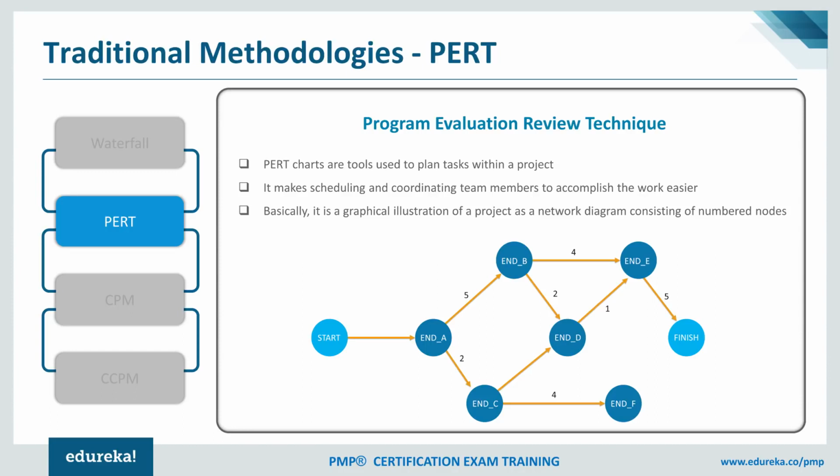And as you can see on the screen as well, we arrange these activities in a particular flow. Through this, we visualize the end-to-end flow of the activities using the PERT technique. We would then be able to work on some of the activities concurrently, and we would know which activities have dependencies. All that was very useful as input to visualize it. Visualization always helps. We would also visualize the end of the project and come up with the total duration that is required to complete the project.